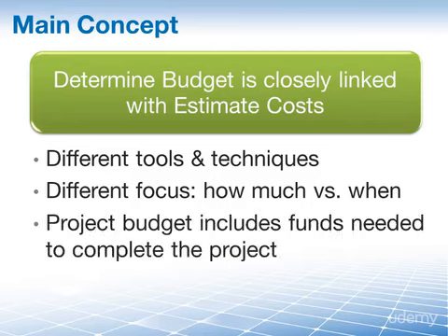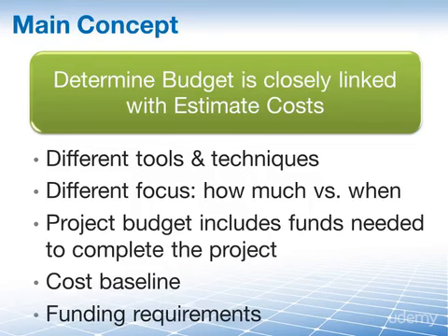A project budget includes all approved funds that are needed to complete your project. The determine budget process establishes the cost baseline against which the project performance can be monitored and controlled, and it also determines the funding requirements for your project.